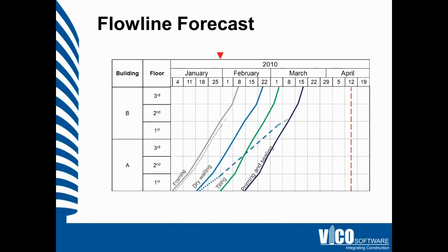We can use that actuals input data in a flow line forecast view, which basically takes the resources to date and installed work to date and calculates a forecasted projection of what the balance of that activity would look like based on the remaining quantities of work in your schedule. This, of course, will have a relationship to the other activities based on their logic, and will identify if weak production on a predecessor activity is impacting the start dates or continuity of the forecasted successor activities.